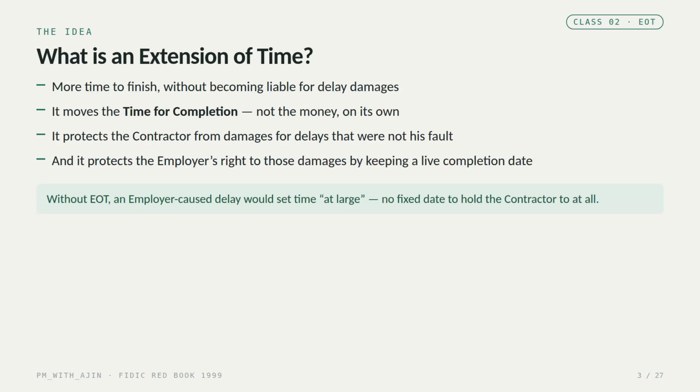So first, what is an extension of time? In plain terms, it's more time to finish the works without becoming liable for delay damages. It moves the time for completion. On its own, it does not give you money, just time, and it cuts both ways.